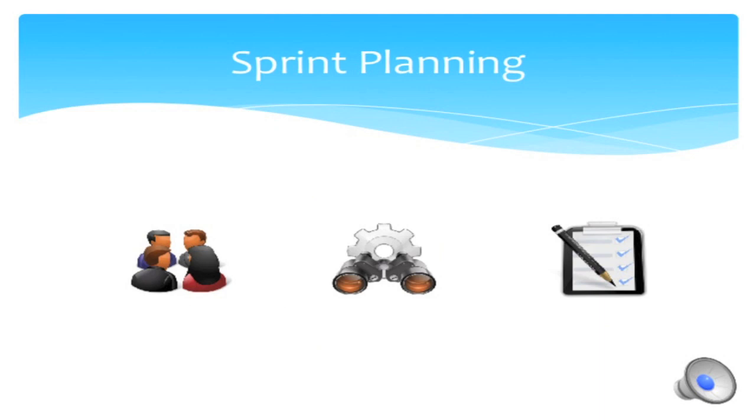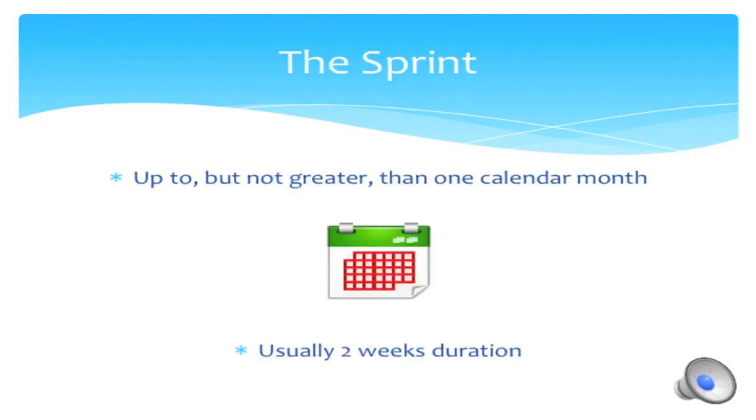In this meeting, the development team forecast how many of the product backlog items can be completed within a time period called a sprint. A sprint can be of any duration up to 1 calendar month long. It's important that the duration is decided early and remains constant throughout the project, as it's an important element for planning purposes. The reason we keep sprints shorter than a month is because it's easy to predict and control work of this duration. Any longer, and we can easily become sloppy in our planning and estimating. In my experience, most sprints are 2 weeks long.